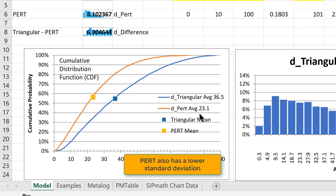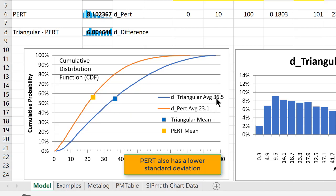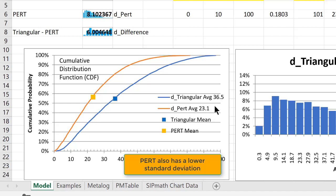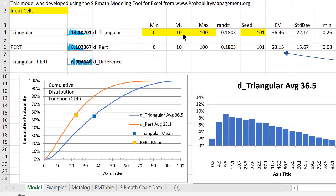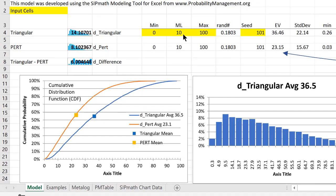The expected value, in fact, is 23.1 versus 36.5, remembering that the most likely was 10. So in both cases, it's more than twice the most likely, but this is a very skewed distribution.